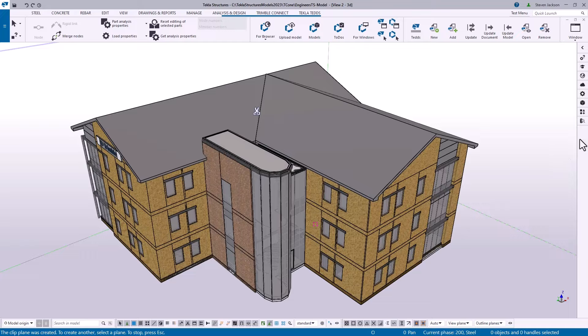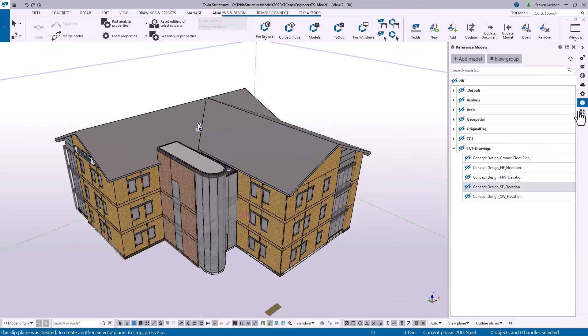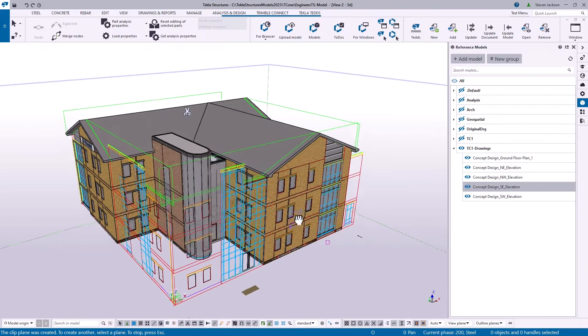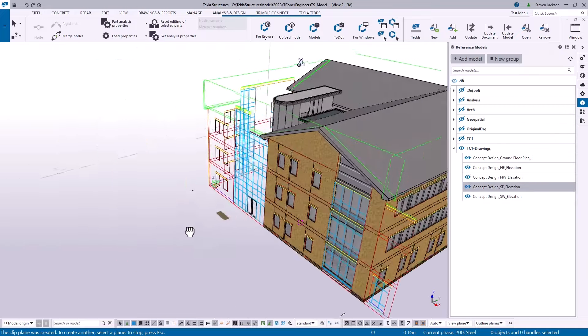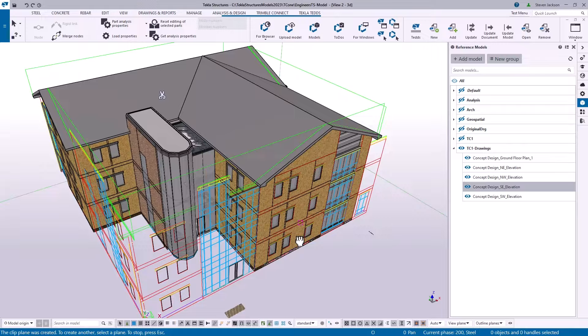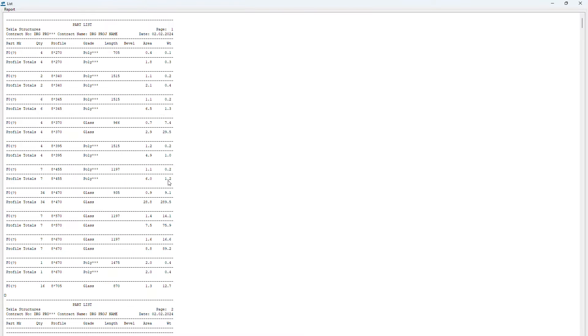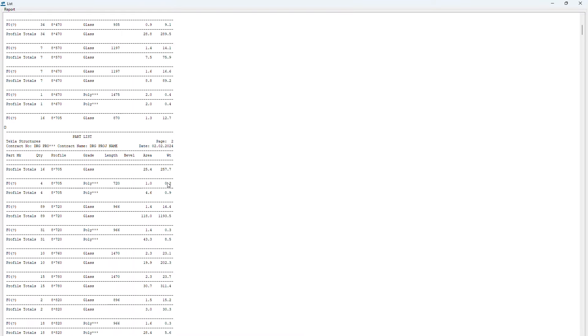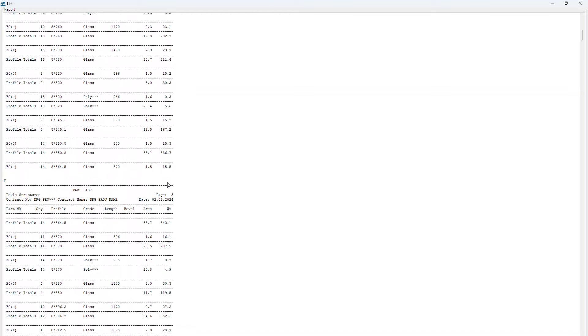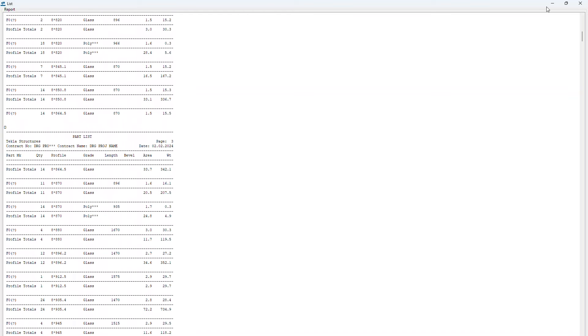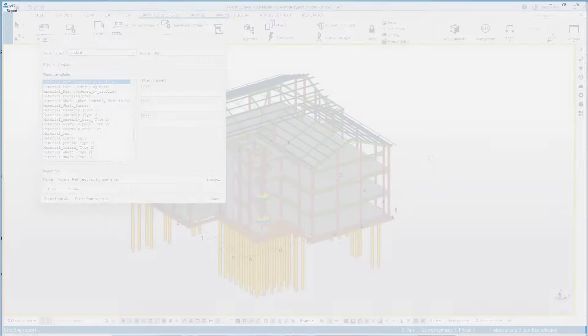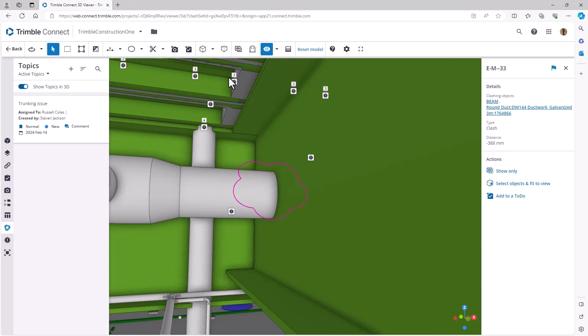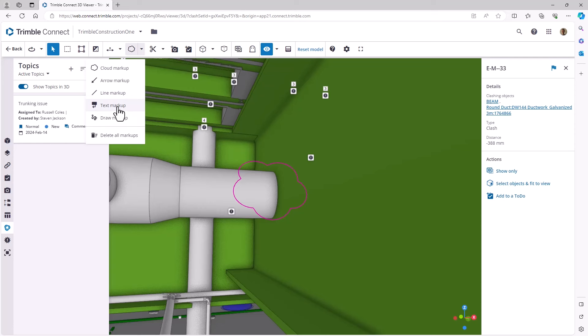We see Tekla Structures used extensively in the estimation and bidding stage. This means you can take 2D information from architects, or you can even take 3D information from the likes of Revit as an architectural package. Convert that into IFC and then you've got your bill of materials there ready to go. So you get all that information in there and you'd get linear weights of your material. You'd get an idea of the lengths that you'd need to cut so you can really do your forward planning at an early stage and get everyone on board early on.